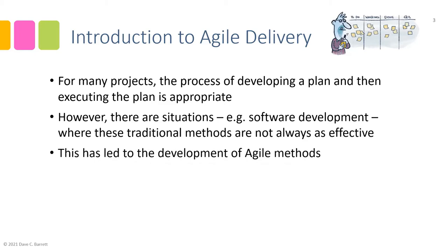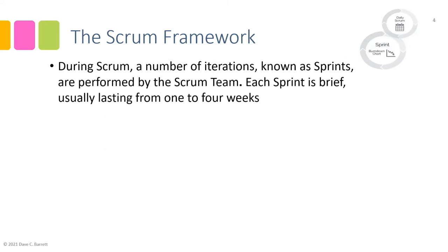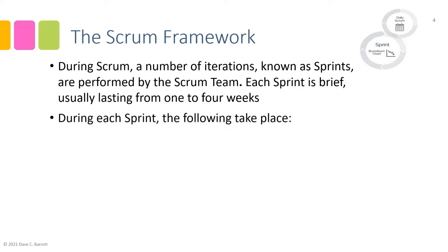This has led to the development of agile methods. Agile was born from the software development industry. While there are many agile frameworks, this course will focus on a very popular one called scrum. During scrum, a number of iterations known as sprints are performed by the scrum team. Each sprint is brief, usually lasting from one to four weeks, and within a project each sprint is a consistent duration of time — if it's one week, all sprints will be one week; if it's three weeks, all sprints will be three weeks.